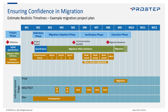You want to start after the project kickoff, where all stakeholders need to be available. You then start a specification phase where the technical teams together with the business teams look into what actually needs to be done. During the discovery workshops you won't go through every piece of the migration project, but in the specification phase you want to get deeper — establishing the actual mapping, how you're exporting, how you're importing, and things like that. In parallel, you're setting up the infrastructure so teams have access to corresponding systems, virtual machines, VPNs, and so on.